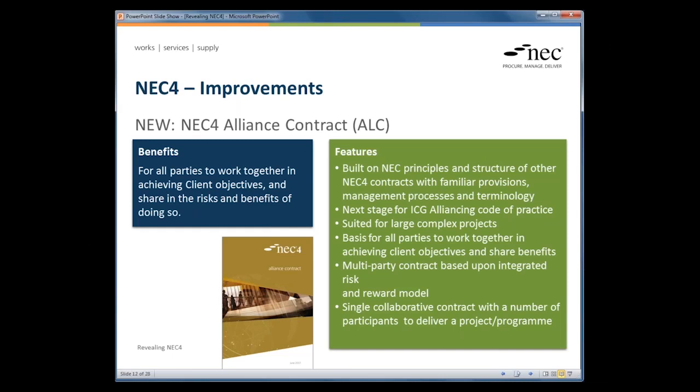And what this is going to try to do is drive that integration to the next level, make the parties work together to achieve the client's objectives. So it's a multi-party contract based around integrated risk and reward sharing, whereby the contractor, the consultants, the client are all working together to achieve a set of targets. If they achieve or better them, they get a reward. If they fail to achieve them, they suffer a reduced return. We're very much driving that collaboration and that integration.